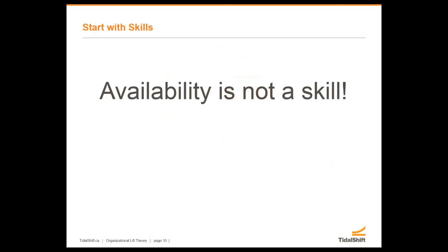I want to plant this seed: availability is not a skill. When we're doing our project plan and figuring out what jobs need to get done, we think about who's going to fill those jobs. Too often, we end up having a person on the project because they're available and not necessarily because they're the right resource. Going back to our digging scenario - if we're switching to a backhoe, we want someone with backhoe operation skills. We need to make sure we're getting the right skill sets to fill the roles.